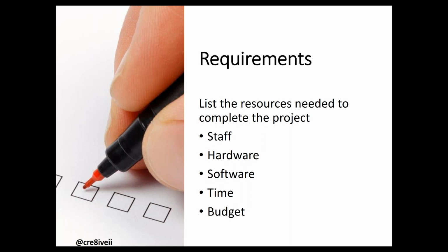So not only your internal staff, the development team, but what other resources are you going to need to help you with this project? We found in the project that we did for the real estate company that we really had to engage and involve IT, because we had to make sure that we understood the equipment that was being used, how people were using it, and then where they were using it. But we also wanted IT, if there was an issue with the technology, we wanted people to go back to IT, not necessarily come back to the talent development group. What hardware and software is going to be involved, how much time is this going to take, and what is the budget.